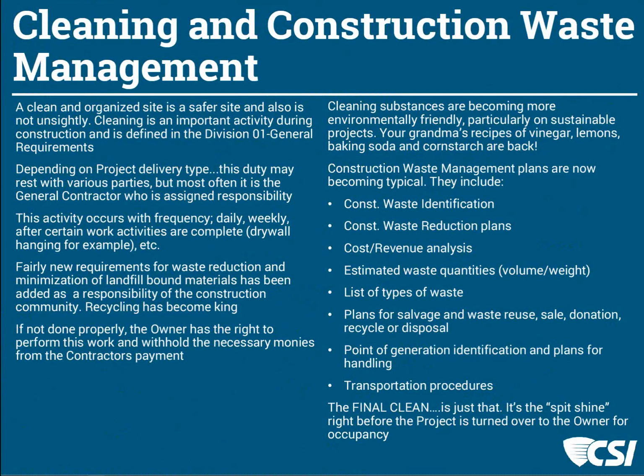So the delivery type, as we've talked about, design, bid, build, is what these are based on. But on some occasions with different delivery types, there may be other people involved in some of these responsibilities. But typically it's a general contractor. And their cleanup most often is daily, but at least weekly. And certainly after phases of work that create a lot of debris, for example, drywall hanging might be something where there's a certain focused effort on cleanup after an activity is finished.